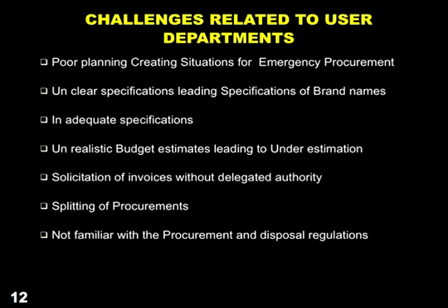And now it's also by law that every procurement that you do has to be on your procurement plan. So I don't know how we are going to enforce this, but it's very necessary for us to develop procurement plans. Why do we develop these procurement plans? We want to avoid what we call emergency procurement.